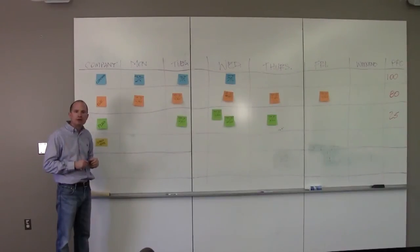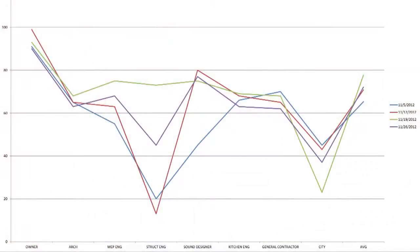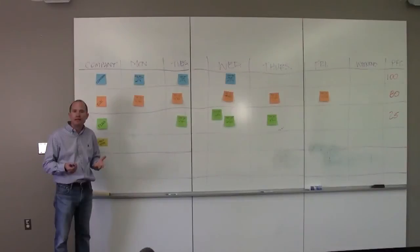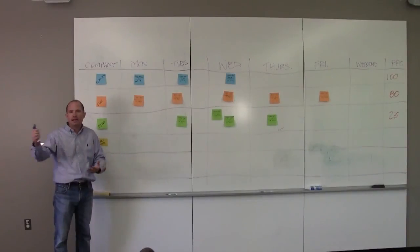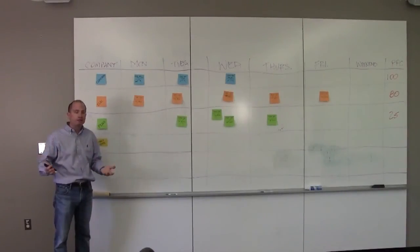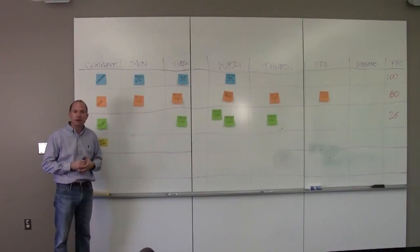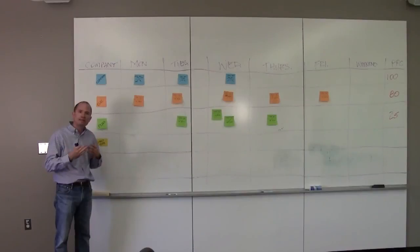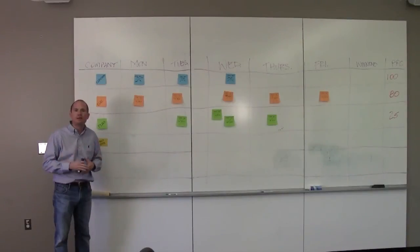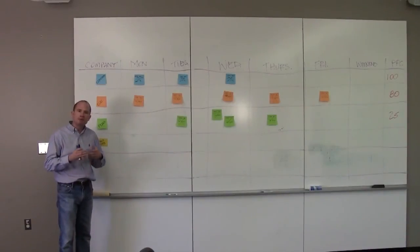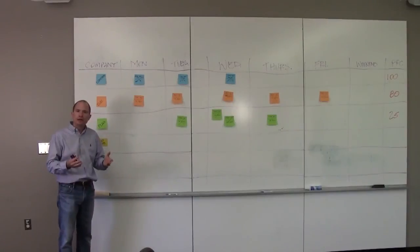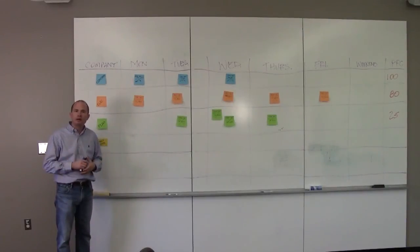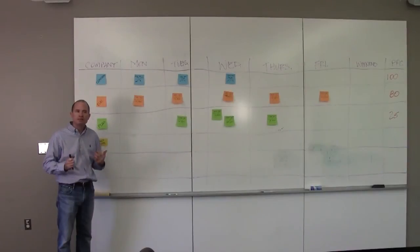I've also got some charts that you can use and you can display these at meetings. Say you're tracking your percent plan complete of your owner's meetings. And maybe architect, engineer, and maybe even city people are there as well. When you come away with tasks in those meetings, you can track and make sure that they are doing what they said they were going to do. And it's a simple graph showing who is performing at what level. And it also communicates to the team of, hey, we need to make sure that we can all hit this.